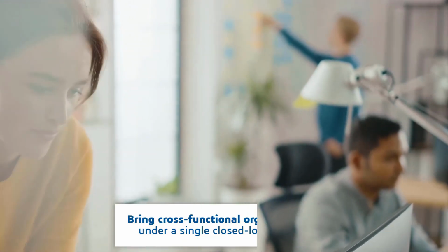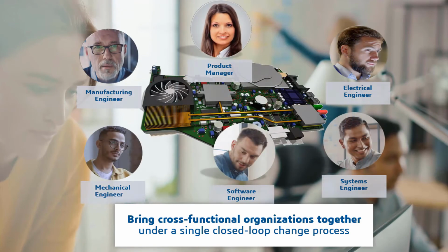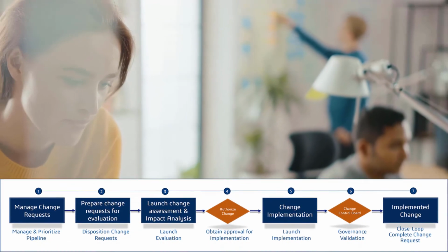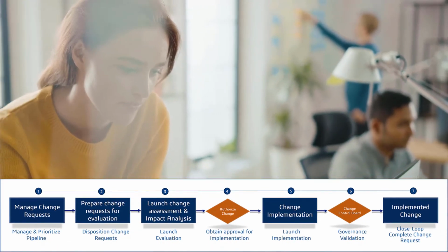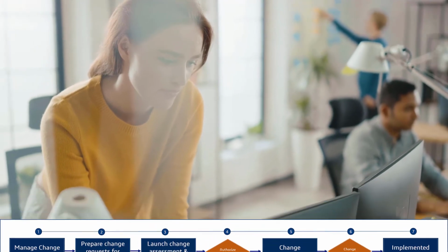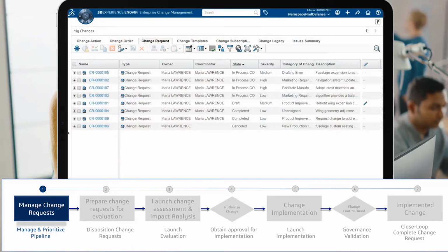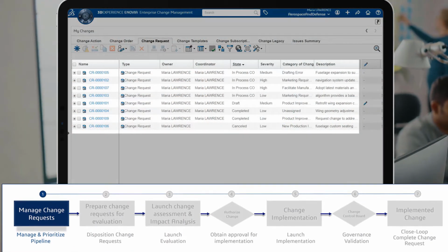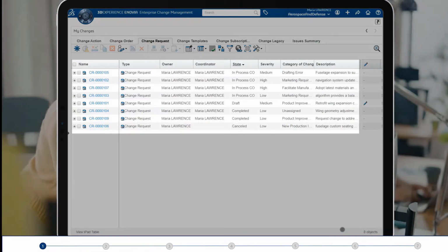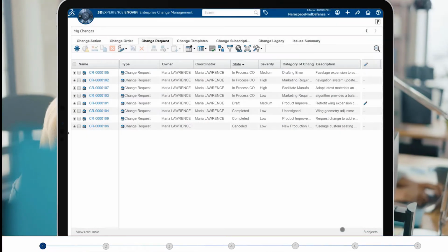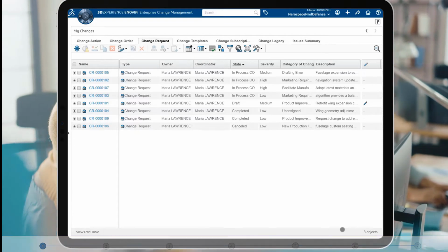Our Change Manager will basically be responsible for the entire change procedure, and that usually happens across an engineering team or any other team that may need change documentation. It all starts with a change request, and pretty much any user can request a change, and it's up to you as a Change Manager to validate that, or accept that, make sure that it is an actual valid change. Once you accept that, then you make that into a change order, which you assign to somebody, and that person can then use that change order to create a change action.